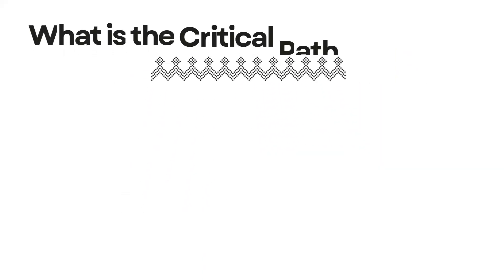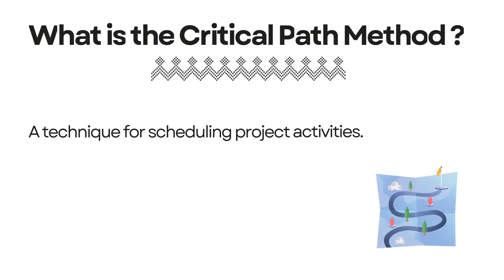First and foremost, what is the critical path method, sometimes shortened to CPM? It's simply a technique for scheduling project activities. Think of it as creating a roadmap that shows the longest path through your project — the sequence of activities that determines your project's minimum completion time.